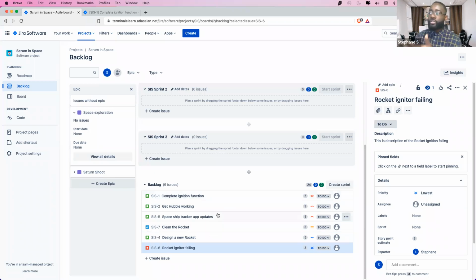Okay. So let's assume that our dev team has 3 people. Let's say 3 developers. And let's say we are going to be selecting those 2 items or 3 items, right? 1, 2, and 3, or 1, 2, and 5. What we're doing during the sprint planning, we talk about that. We can refine if those highest priority items are not refined. We estimate them, because everything that is moving to a sprint obviously needs to be refined and estimated. That's how we're going to know how many story points we are taking in for the sprint.